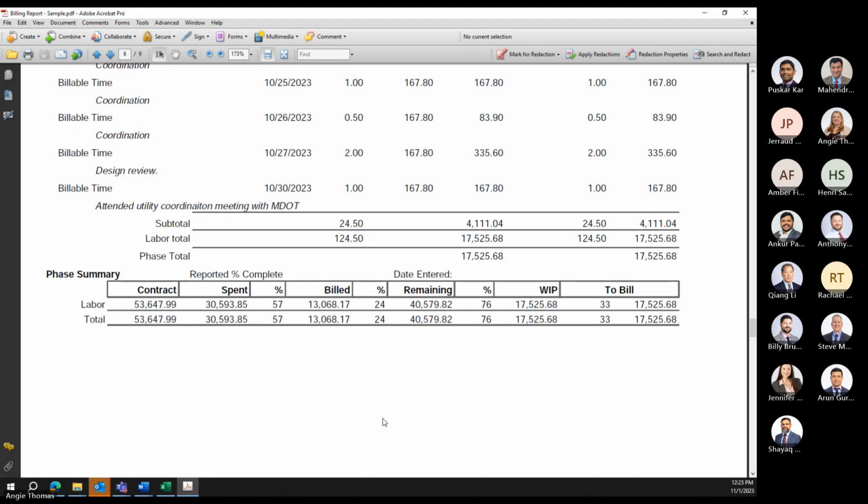Everybody continues to charge the highway budget, but EWO number 2, nobody charges because they don't know what that means. So track that and make sure people are billing under the appropriate phase. If you don't want to track it like that, then just add those extra hours into the original phase, so it actually means something. If that makes sense.